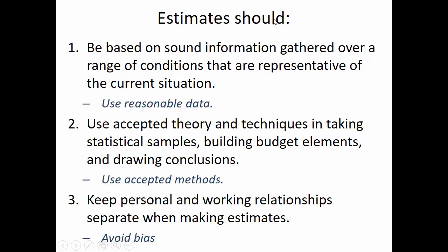In the past, bad cost estimates have come when the information they were based on covered a really narrow set of circumstances. So for instance, if you were using data from Anchorage, Alaska on what it costs to build and insulate a warehouse, that data, because it's in a really specific environment, may not be broadly applicable to the entire United States. The insulation and building requirements in Alaska are probably pretty specialized because it's really cold, has heavy snowfall, and that may not be applicable if you were going to take that cost estimation data and apply it to a situation in Florida.